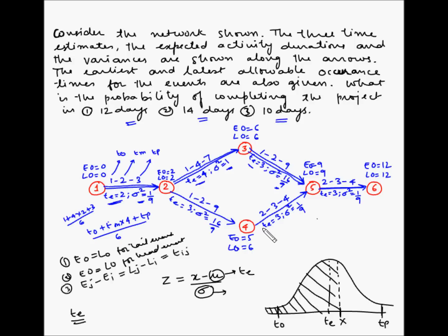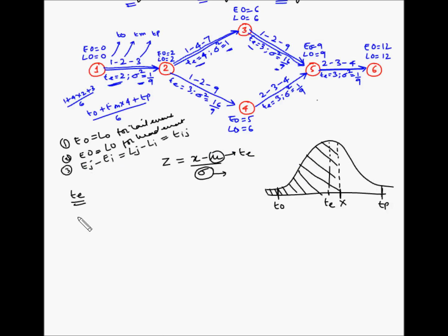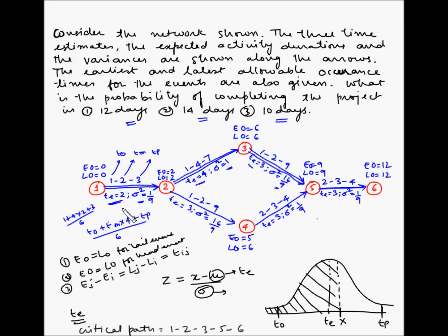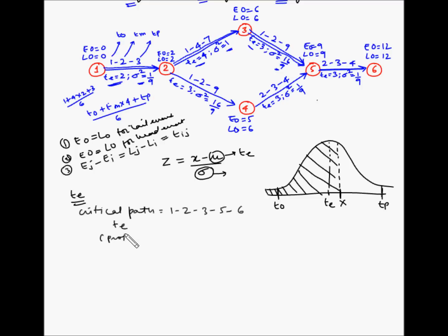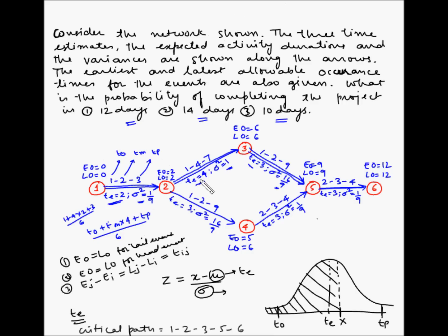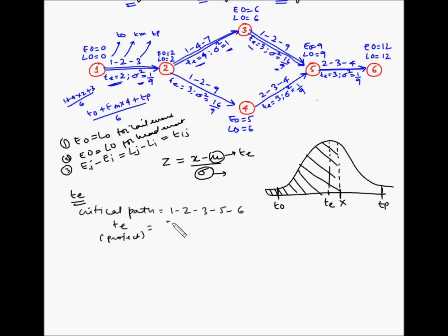The critical activities identified are 1-2, 2-3, 3-5, and 5-6. So the critical path is 1 → 2 → 3 → 5 → 6. The expected duration of the project equals the sum of the expected durations of the critical activities: Te = 2 + 4 + 3 + 3 = 12 days. We have now found the expected duration of the project.